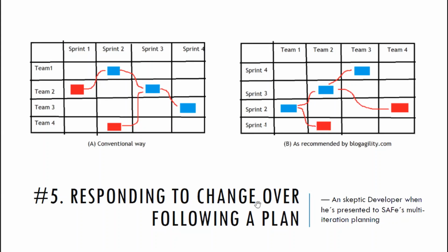And this specifically, this PI planning and this program board, which is one artifact or outcome that we will get from the PI planning event. For the ones that haven't been in a PI planning event or haven't read about it, normally you have two inputs: the vision for the next quarter, and your top 10 features. And as output, you have this program board, which is the holistic way of seeing what the teams are going to encounter and the dependencies that they will have in the next quarter.